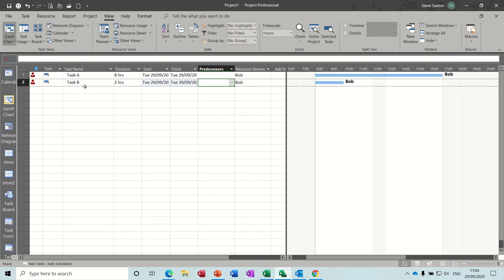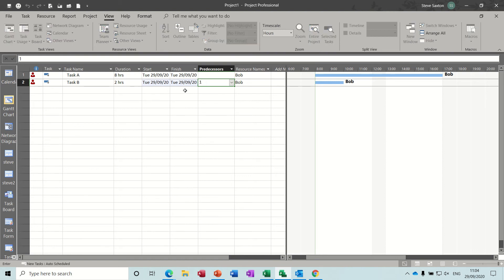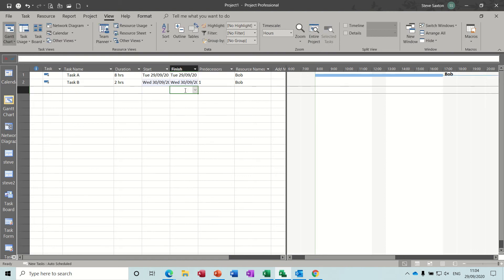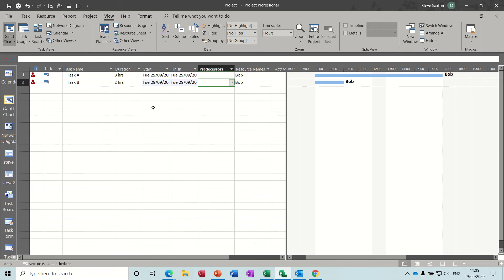So things that you can do to fix this is I could just put a link there which will push that onto a second day, and then it's going on the following day, which in this case is Wednesday. That's okay, that will work, but maybe it has to go on the same day, so I'll undo that one.